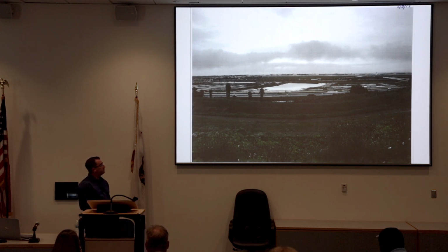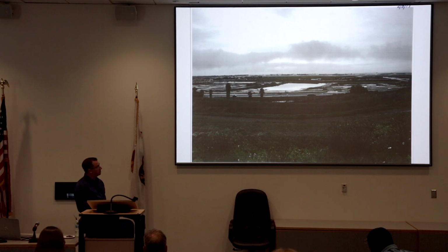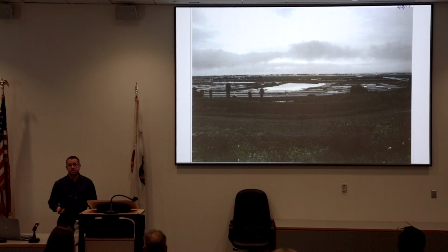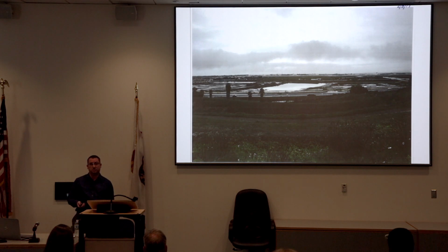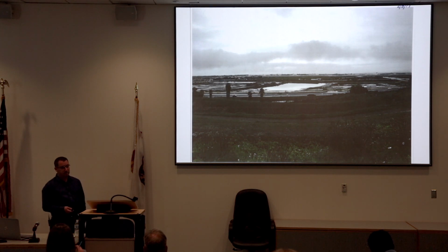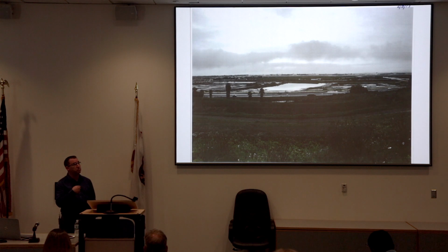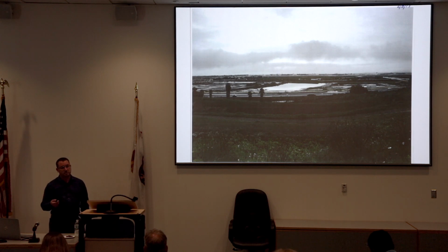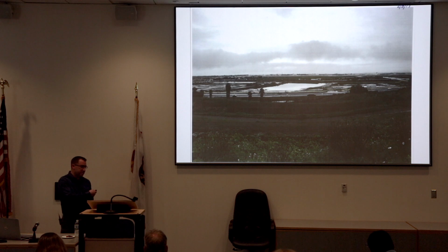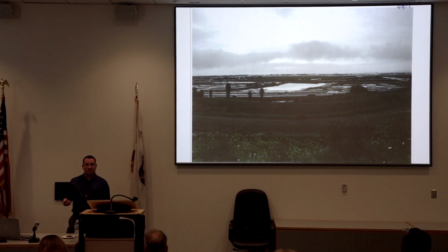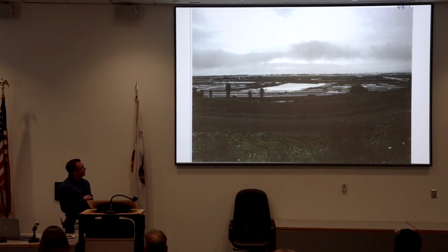It was all inundated because up above this is all Spanish Hills, and everything runs down into these other basins. You can see another basin right down here, and then eventually it goes underneath the road and outlets over to here. They have an ultimate system which is supposed to pick this up, but they didn't have it constructed. When they did their construction planning, they didn't necessarily think that it was going to rain, because it never rains in Southern California. But lo and behold, it did rain, and they weren't ready for it. And they had Venice for a while.